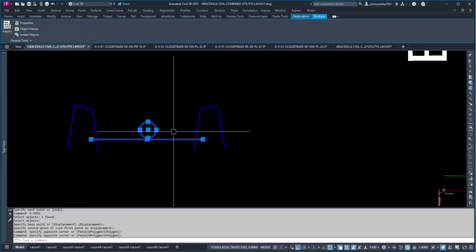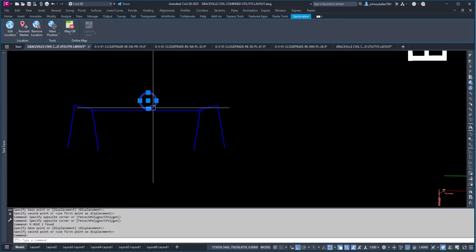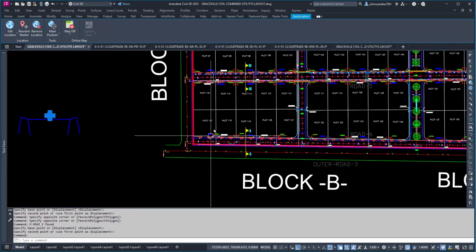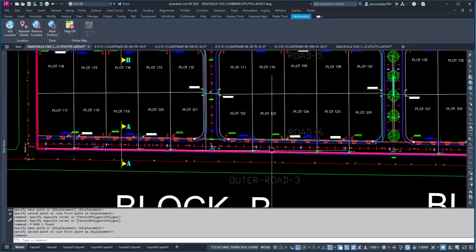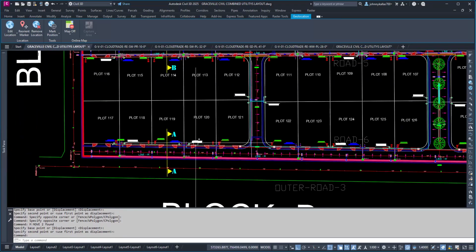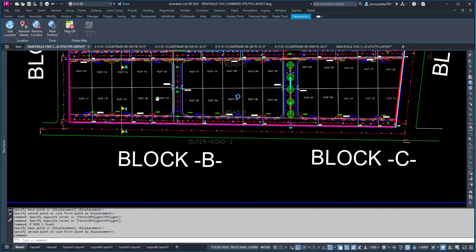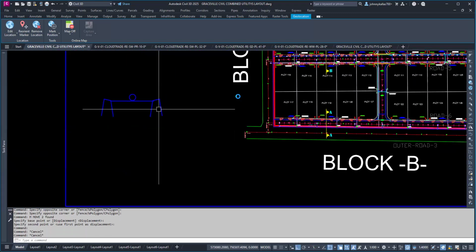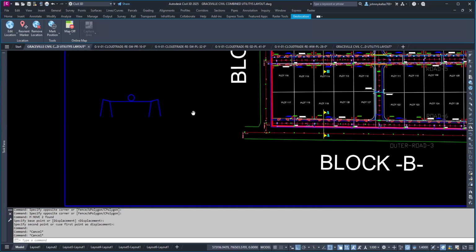After that, we are going to raise it up gradually to reach to this place. When we reach to this place, the pipe will be pumping here. Then we will continue the bound wall gradually to the end. So the water, for sure, will enter inside the plot, but the sand, maybe 0.1% of the sand can go inside the plot. Is this your question? Yes, okay, thank you.